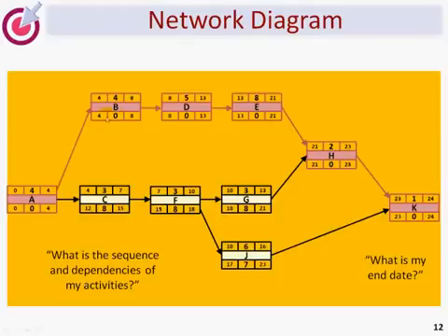These are merely activities with the arrows showing the sequence in which they need to be created. You can see that some of the activities occur after each other, and others can happen in parallel. Again, this will be brainstormed in your planning meeting. The purpose here is if you determine the duration of each activity, you can do something called critical path analysis, and you can end up with the end date.